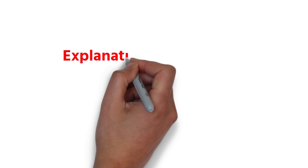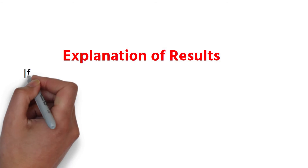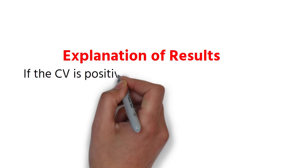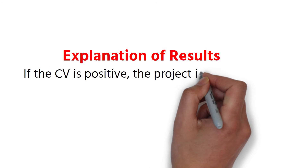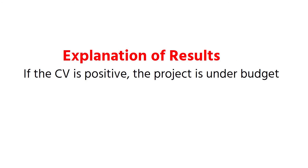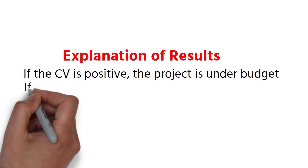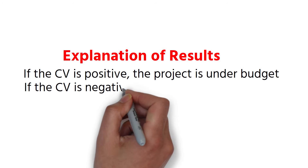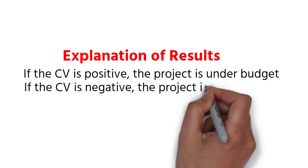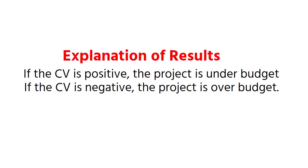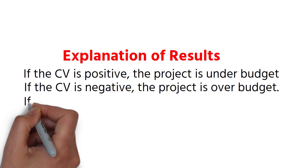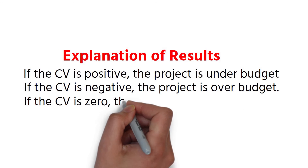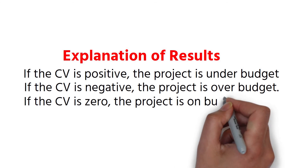Explanation of results. If the CV is positive, the project is under budget. If the CV is negative, the project is over budget. If the CV is zero, the project is on budget.